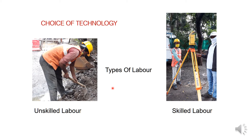The choice of technology also includes types of labor — skilled labor and unskilled labor. When we use unskilled labor, we require more time to complete the work but less cost. If we prefer skilled labor, we require less time and can achieve better quality of work, but the cost will be high.